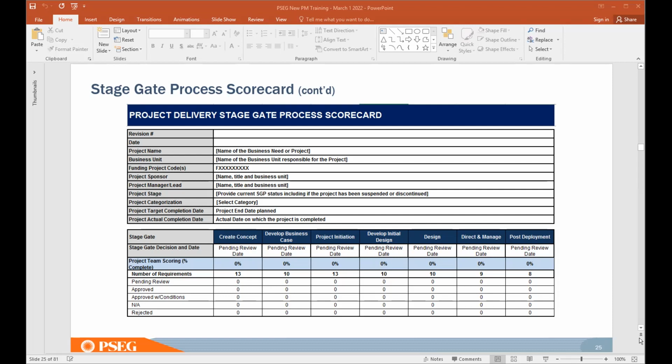But what we can look at is, if it's a formal gated project and 20 deliverables or artifacts were required in a particular phase, whether the project manager or the project team have submitted 20 or they have done 18. If they have done 18, why not? Which 2 are missing? Why are they missing? Who has approved them? So it's more looking at it from a compliance perspective.